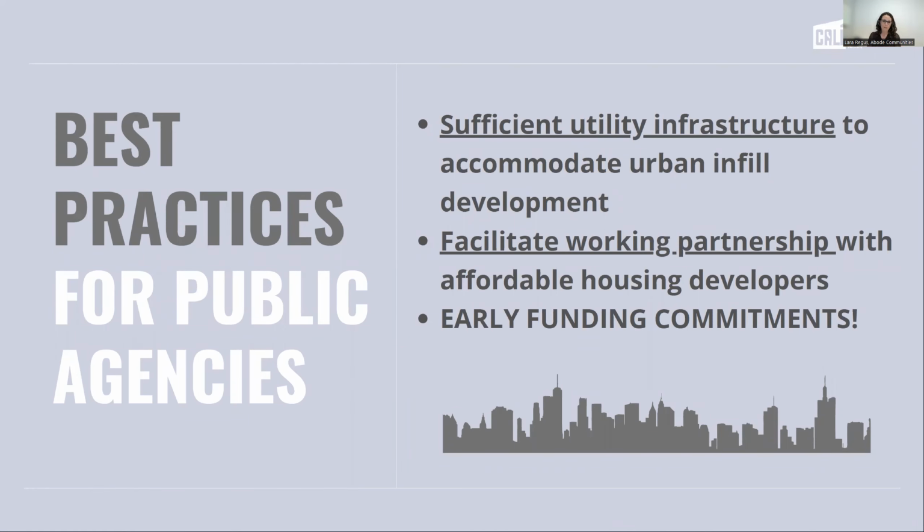And of course, I would not be an affordable housing developer if I didn't leave you with this final comment. On the public agency side, we really need funding commitments as early as possible. Most affordable housing projects have to have local commitments for funding in order for us to move forward and leverage funds at the state level or the county level, depending on the layers of funding that you're looking for.